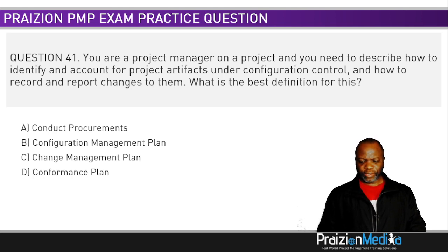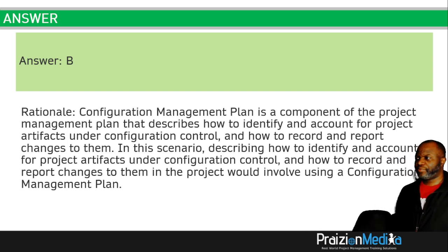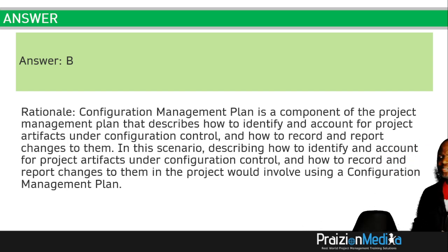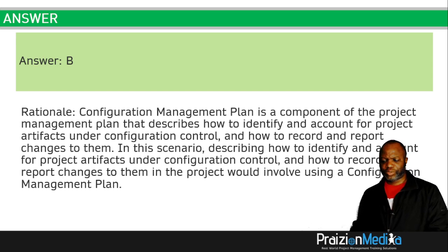All right, let's take a look at the answer. So the best option here, my friends, is configuration management plan. This is a component of the project management plan that describes how to identify and account for project artifacts under configuration control and how to record and report changes to them.